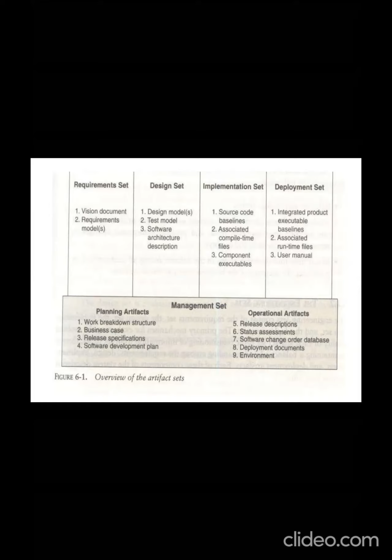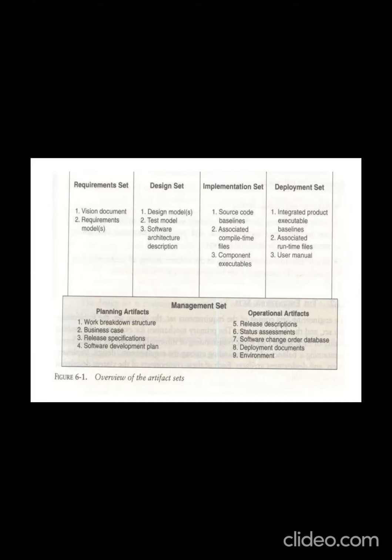And then the management set is classified as planning artifacts and operational artifacts. In planning artifacts, we have work breakdown structure and also business case, release specifications, software development plan. In operational artifacts, release descriptions, status assessments, software change database, deployment documents, environment. All this comes under operational artifacts.